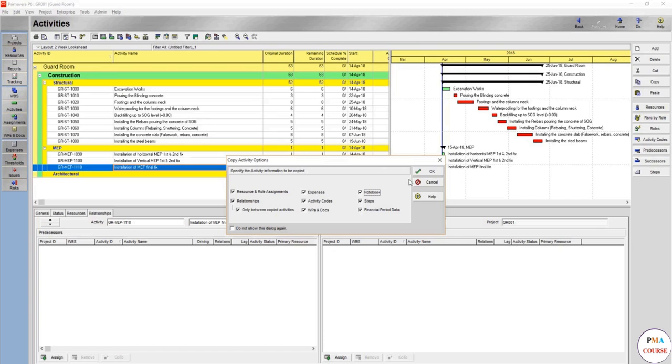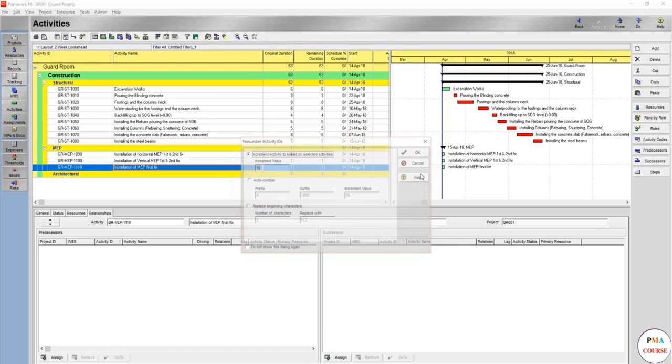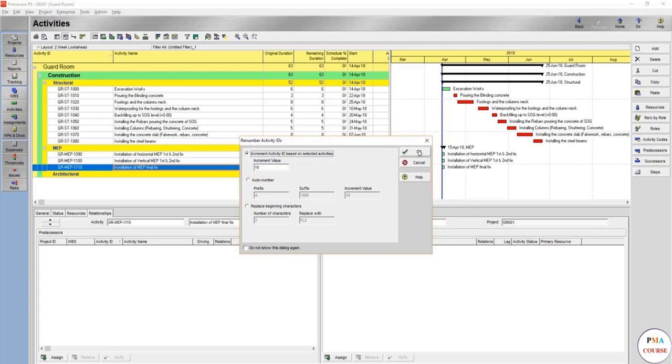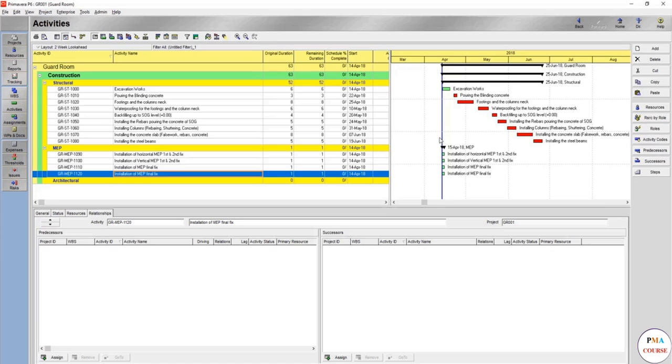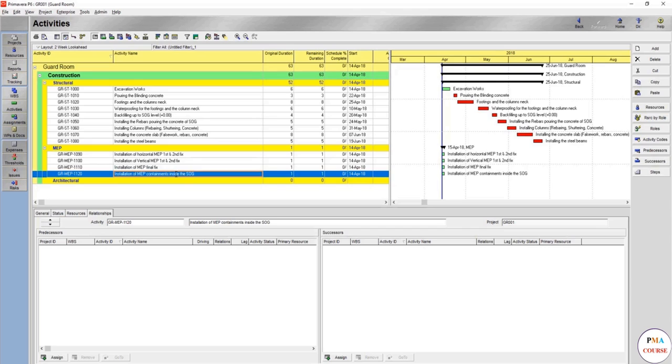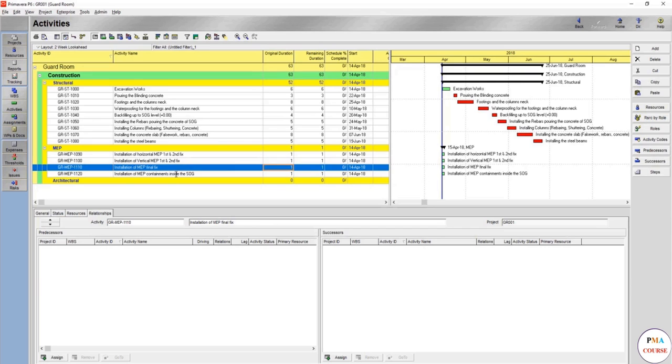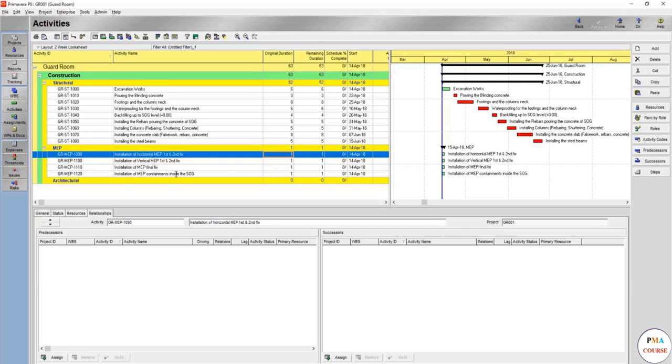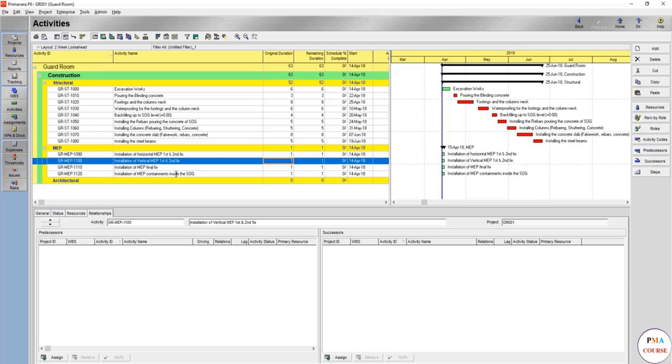We might add activity as well in the structural works and then say MEP containments in the slab of grade, because you're going to do it before the pouring of concrete. But for now, we will keep it here—installation of MEP containments, whatever it contains, whether floor drain or electrical containments inside or before the slab of grade, SOG.